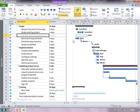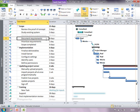One important thing to observe here is the next successor activity even though has a link, the link will no longer be respected. This is as good as removing the task from the project schedule. So document requirements will now automatically start as though there was no link attached to it.